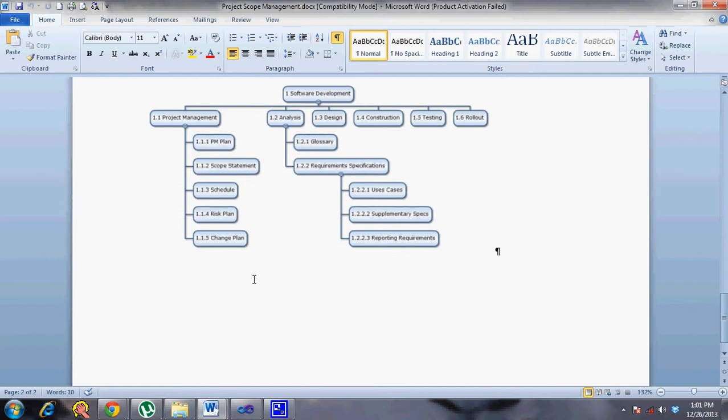So if the team is working with you, you normally sit down with them and break that down into activities. But if you are outsourcing the work, then you provide this work package as such to the contractor and then they break it down into activities. But then the activity list helps you manage things at a better level on a day-to-day basis. That's where you come up with the activity list.